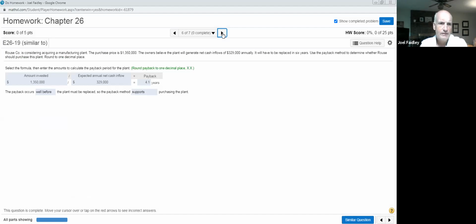All right, number 6, Rouse is considering a project acquiring a manufacturing plant, purchase price $1.35 million, expects to generate $329,000 annually. What's the payback? All right, 4.1 years. Okay, so that one was not 4, wasn't 5, so it's 4.1, but it was even cash flows. It says it will have to be replaced in 6 years. So the payback's well before the 6 years, right?